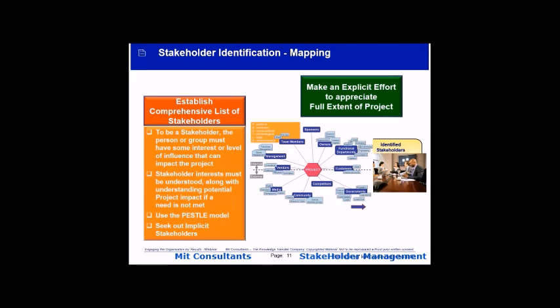The PESTLE model that you see here is a very good technique as well, very much like a breakdown structure. You break it down by major centers of interest, political, economic, etc. That's another way of being able to scope as much as possible at an early stage who's involved. From that, you can schedule and prepare meetings and interviews, obviously for reasons of the project, which are to establish